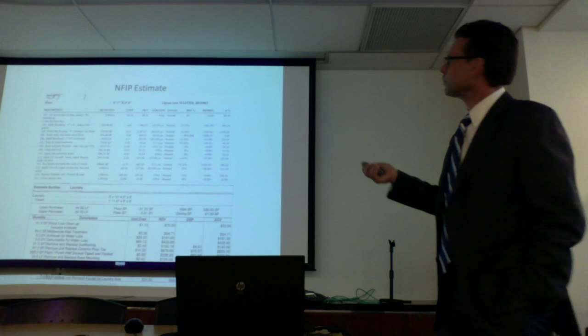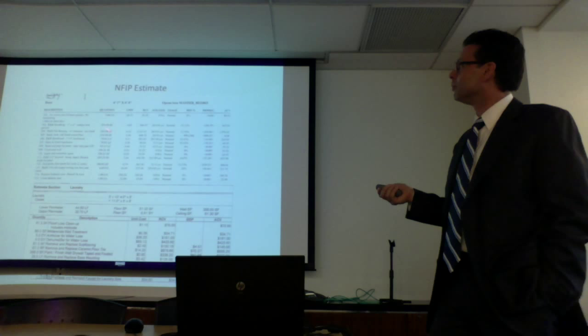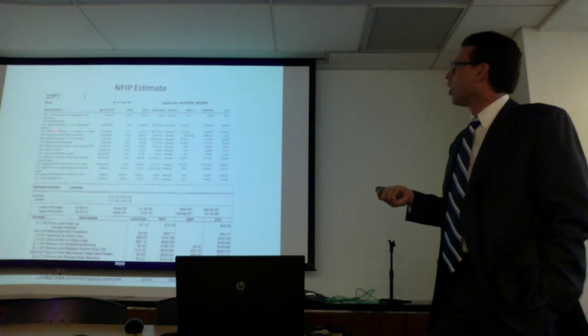When you mentioned before, how do we look for these items? This is an example of an Xactimate estimate and a Simsol estimate. R&R sheathing, tongue and groove, it is in the room. If you see it in any room, it doesn't include what's under the walls. R&R oak flooring, you already know that they didn't put in to remove wet flooring.